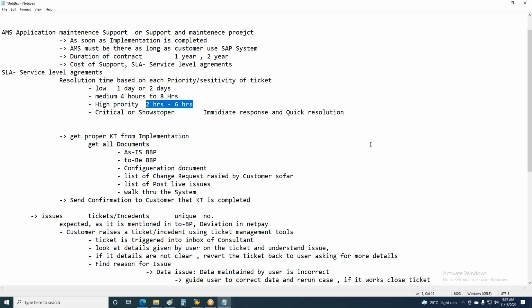If you don't give anything, if you don't follow, he will see one ticket, two or three. After four, he will escalate it to the management, saying we are not following the proper SLAs, so we are authorized to terminate the support contract. Or sometimes there is a fine defined clearly. If the ticket is not resolved within SLA time, these are called aged tickets. For every aged ticket which is not addressed by the functional consultants, the company, TechM or a consulting company, will be fined.